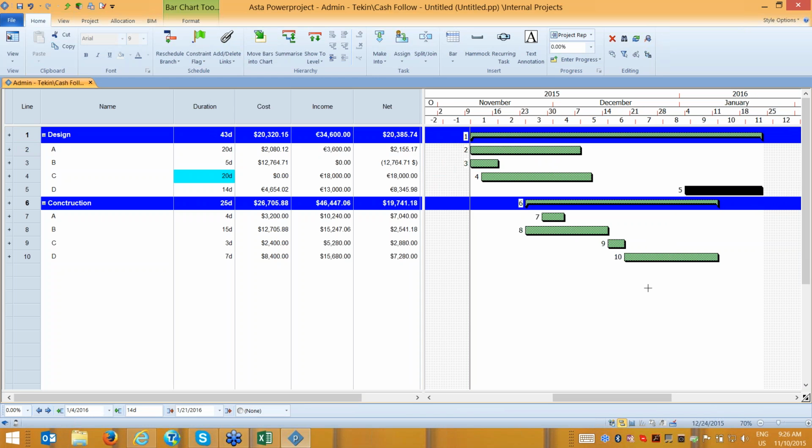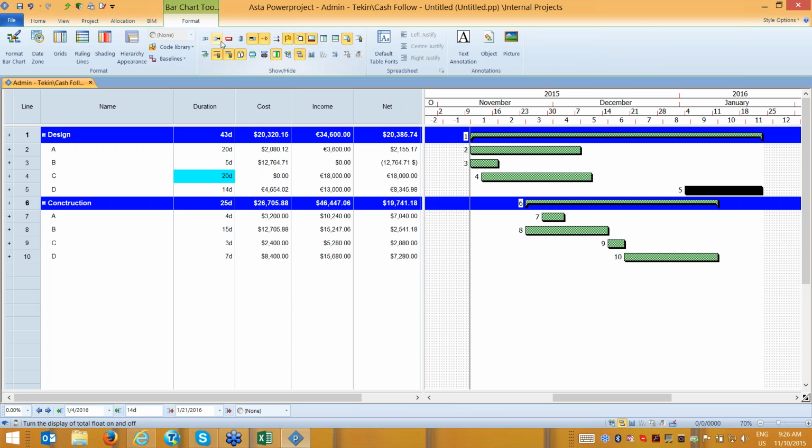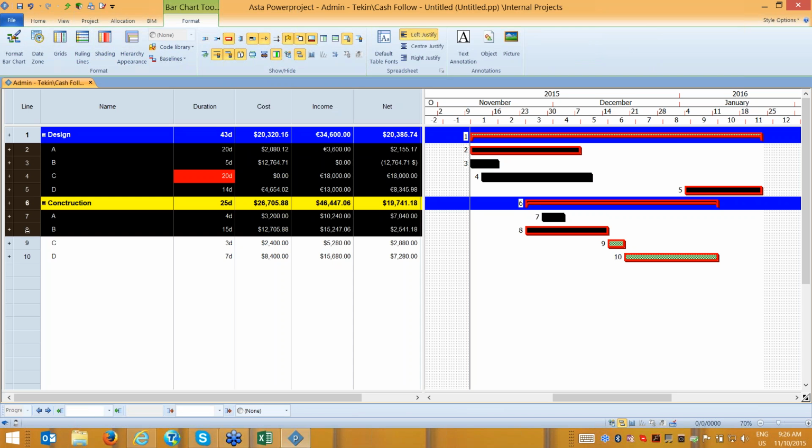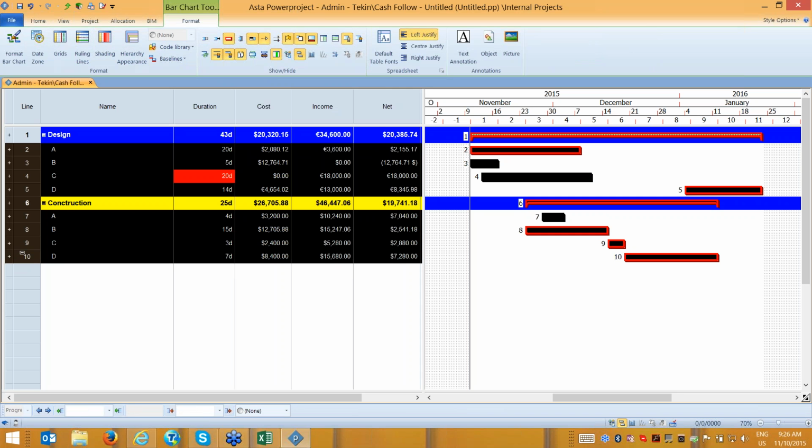And of course, we have full critical path calculation, because we can create a logic between activities, and it also provides us critical path calculation. Critical path calculation is very important, because it gives us an easy understanding of which activities are most important. If the activities are critical, we need to give high priority. This is very important. If I have 1,000 tasks, it is important for me to know which tasks are critical.